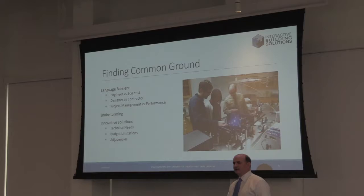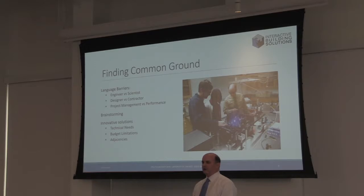And so understanding how a scientist can talk to an engineer and develop the right set of specifications, where you don't have things that go terribly wrong. One good example is in the building I'm in, we had a problem with low temp processed chilled water. Someone said, we need 80 PSI water pressure in order to supply our pumps. Sounds like a good specification, it's what we always had. So we got 81 PSI supply and 79 PSI return. 2 PSI differential. We didn't specify it as a differential pressure, we specified it as absolute.